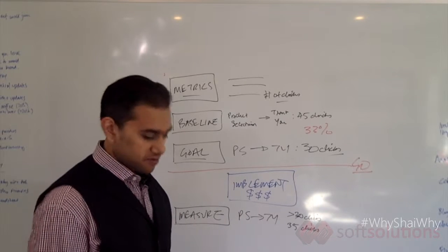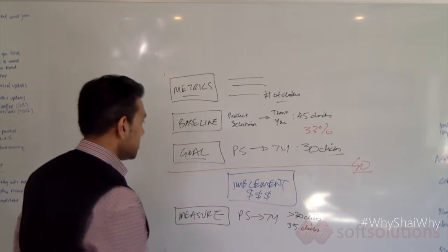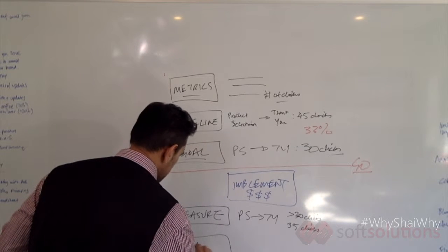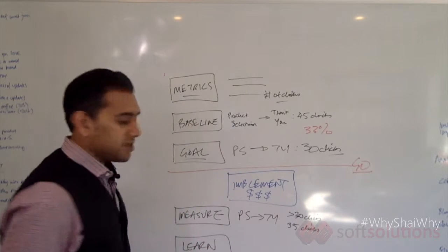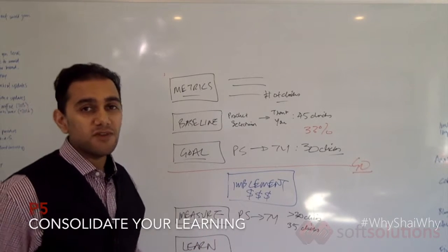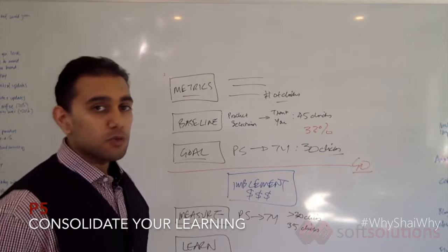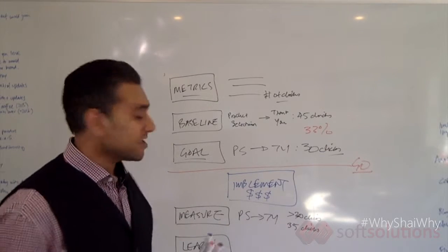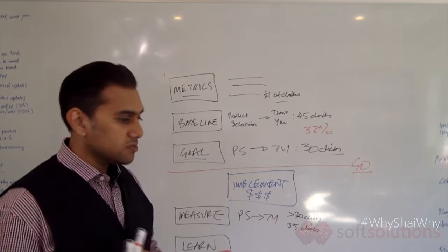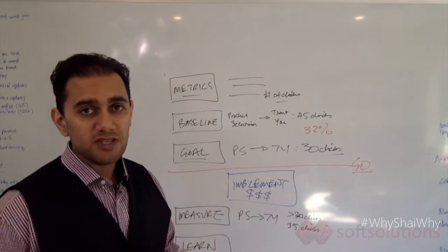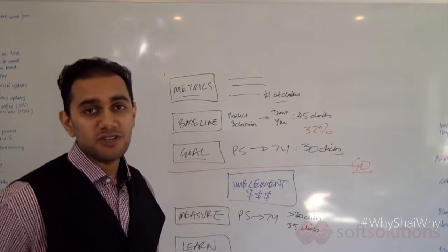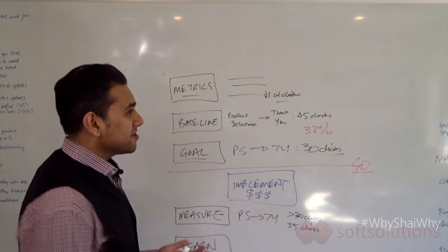All right, really important. Okay, guys, the last part, and this is one of the most important parts of the whole project, and way too often is it forgotten, is to learn. Get every stakeholder you can find, get them all in a room, get them all on a conference call, get them to talk to each other, right? Answer some really basic questions. What worked well? What went well in your project, right? What didn't go so well? What can you improve, right?